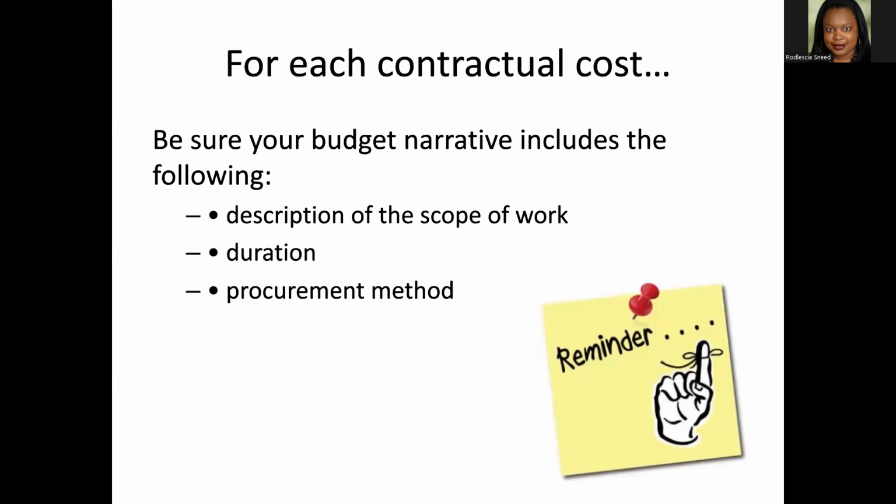So at the county, we had a standard procurement policy. If we had a cost over $20,000, those items had to be bid out in a formal process. So we would do a scope of work, a bid out process.